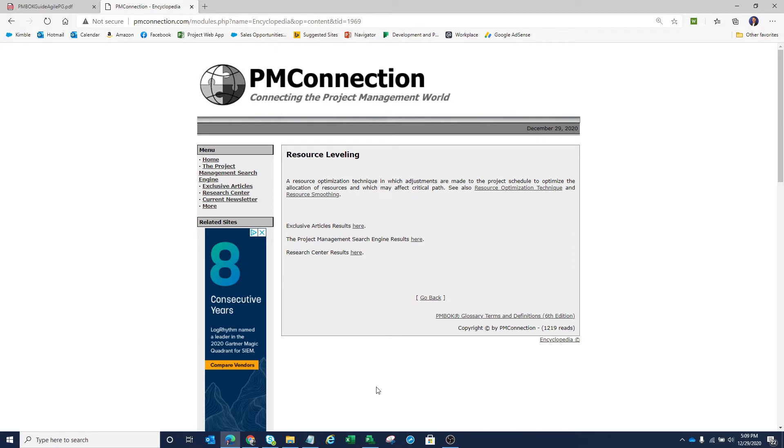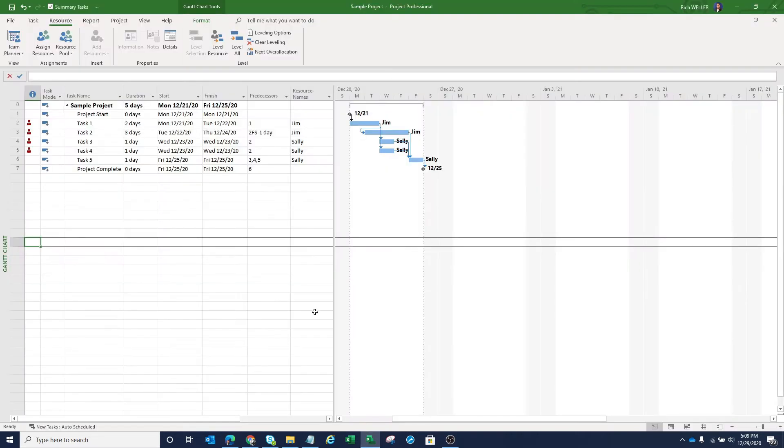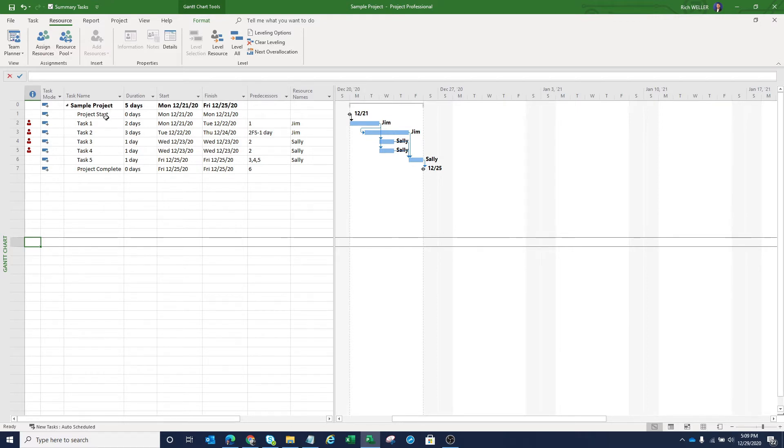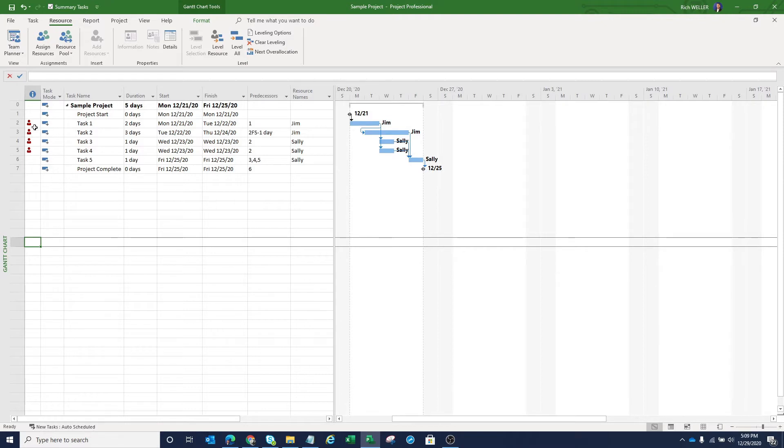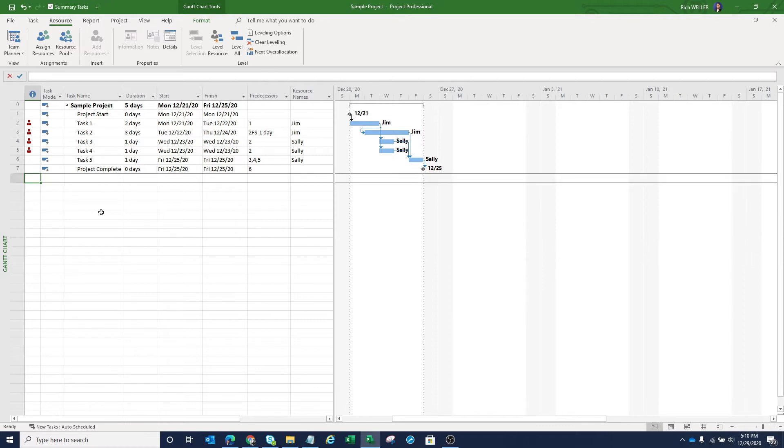So what I've done is I've actually created a little schedule here in Microsoft Project. You can see I've got a sample project here with a project start milestone and a few tasks and a project complete milestone. Over to the left here, you can see that we have a number of heads that are appearing. These heads that appear in this version of Microsoft Project indicate that we have at least one resource on each one of those tasks that are over allocated.